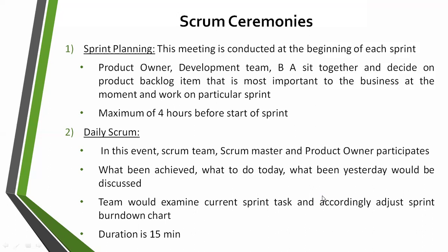The estimations would be done during this. If you have the Scrum Master, that would be well and good. You're saying that only developers are there. Fine, but if you want to follow proper Scrum protocols, the suggestion is that the Scrum Master would be there. So we all sit together and have a chat about what work needs to be done in the next sprint. As per the Scrum Guide, the maximum duration for a sprint planning meeting is 4 hours.